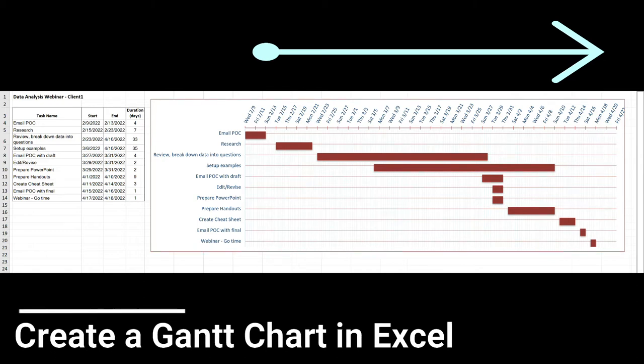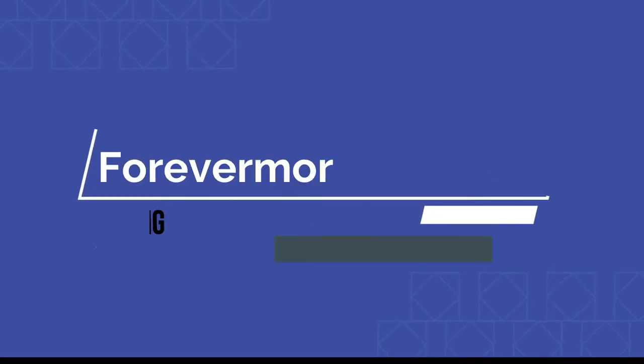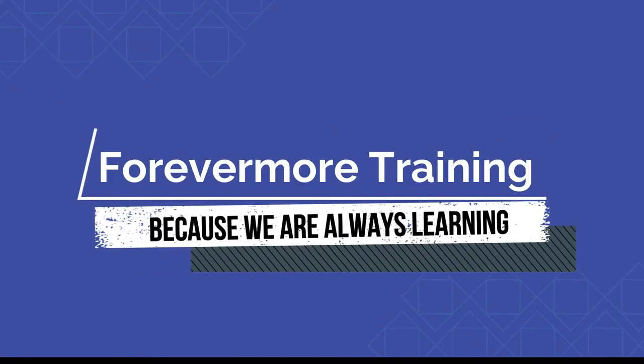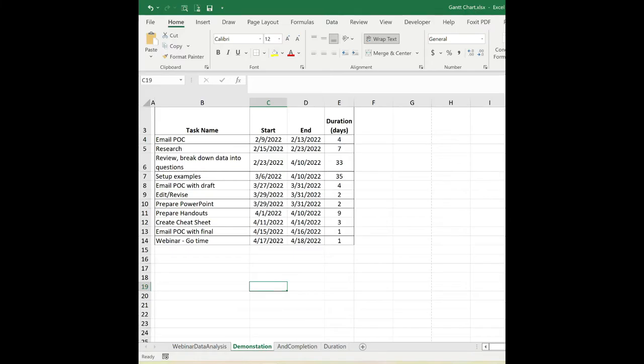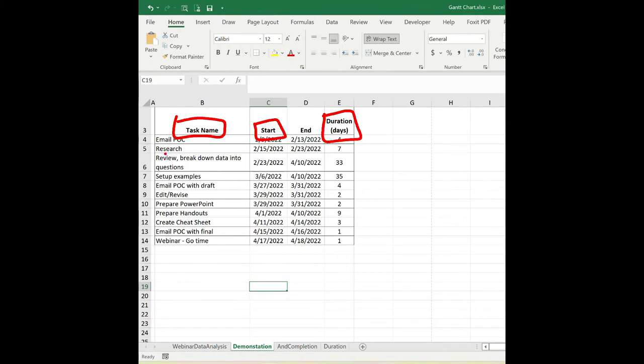Let's create our Gantt chart. First, you want to create a project table. You want to create a column for the task name, the start date, and duration. Then you want to list each of your tasks along with those actual start dates and the duration.